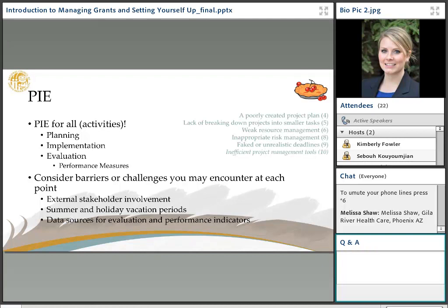I think it's pretty standard for a lot of folks, especially those within federal agencies, to take off a lot during the month of December around the holidays. And so if you're factoring those into your planning process as you're writing the grant, you can try to avoid having deadlines around that time that you might be reliant on your funders for feedback. That could potentially put you back, or work group members or other stakeholders,